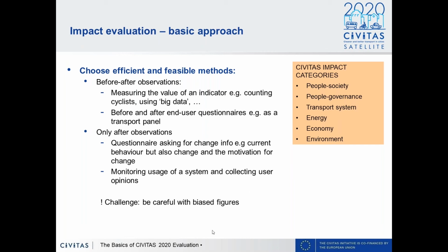However, especially in relation to the only-after observations, we really have to be careful because in many cases you have a high risk of biased figures. Because if you install a car sharing or a bike sharing system and you ask questions afterwards only to the people who are using this system, of course, you have a very limited view of the impact of your measure.